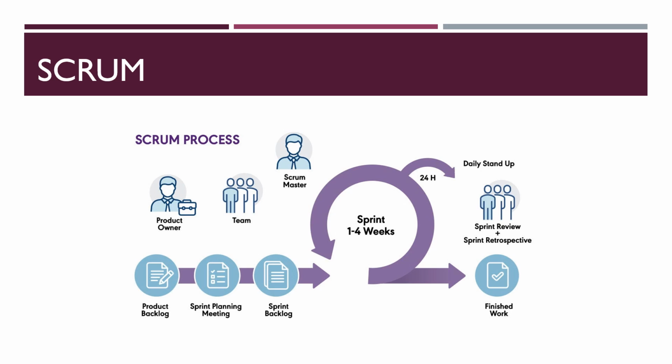Epics are nothing but large chunks of work that can be divided into stories, and user stories are short requirements written from a user's perspective. Both of them can be included in the product backlog, but only the user stories are included inside the sprint backlog.